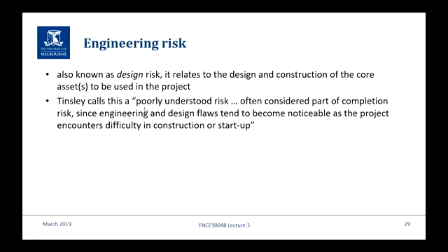Now, Tinsley says that it's a poorly understood risk, and it's often considered part of completion risk. And in fact, Yescom listed it as one of the things relating to completion risk. But Tinsley said, well, no, it's specifically not the cost overruns and all of the issues that arise in completion risk. The problem with engineering risk is it doesn't work because you haven't got the design of the technical facility, the technical equipment right. And you only realise that when you get to the point where you push the button and nothing happens.